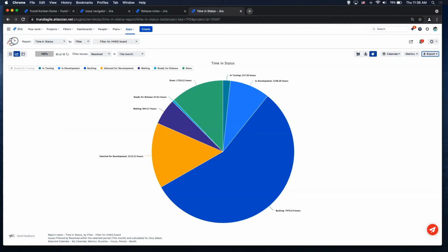Why I like Kanban is because it's representing my process, and I'm steadily flowing work through it, and I can release on demand. I can release whenever I feel is the appropriate time to release, whereas with Scrum, you typically don't release until the end of an individual sprint or that 2-week time box.